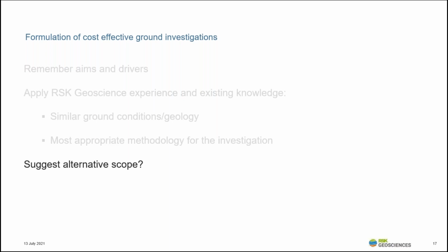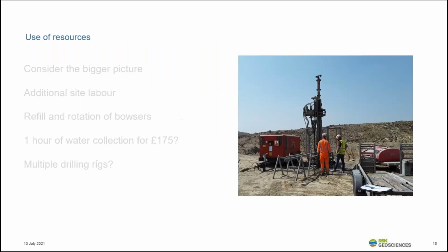And as I've alluded to, don't be afraid to suggest and discuss with the client alternative scopes if you believe that, based on your knowledge of the site, a different approach will gain better quality of information for them. So, use of resources: when you're designing your ground investigation, consider the bigger picture and possibly where additional items can reduce the time or increase efficiency on site. For example, would the inclusion of additional labour resource or a labourer on site help the higher value assets to keep working? An example of this could be